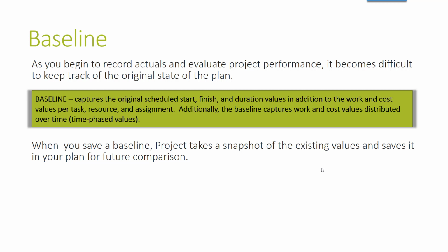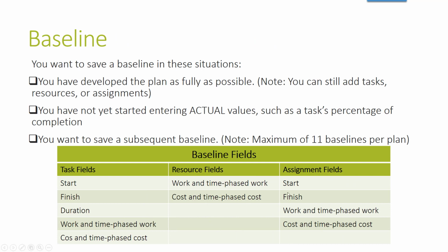It's very important that once you have most of your tasks and most of your data in there, before the project starts, you capture what you anticipate these values to be. So you want to save a baseline in these situations. You have developed the plan as fully as possible.